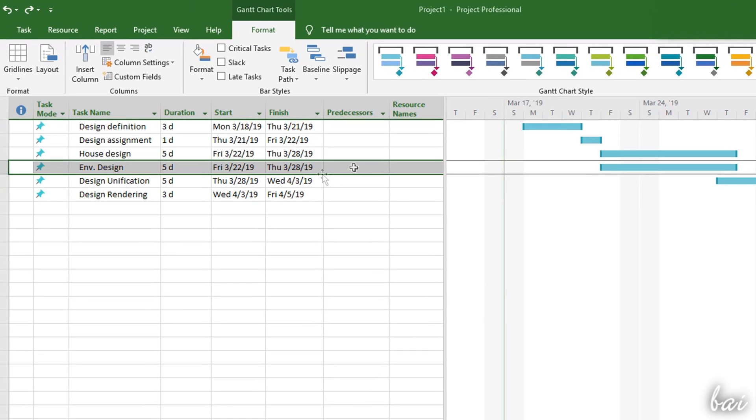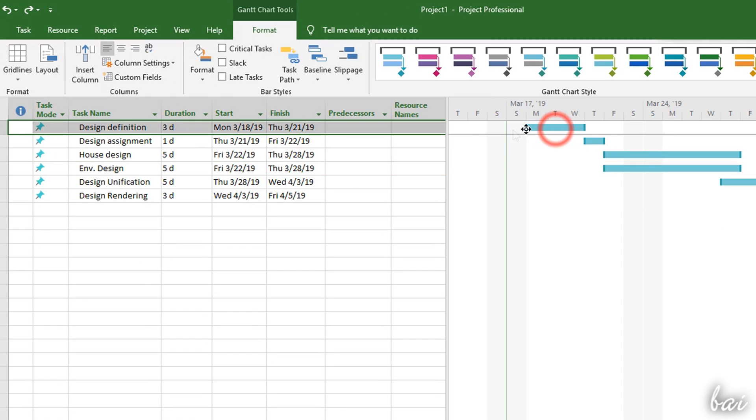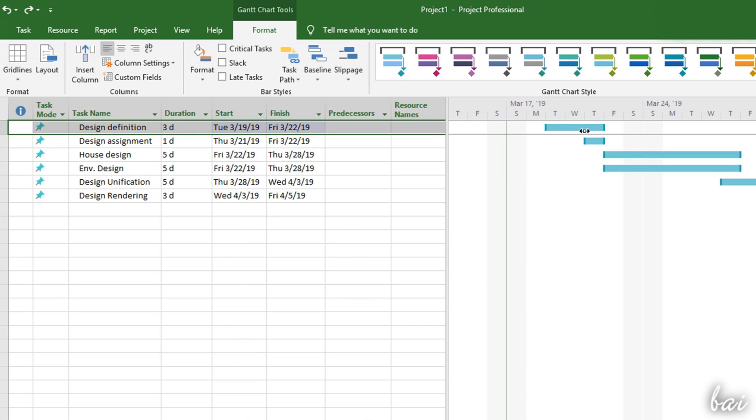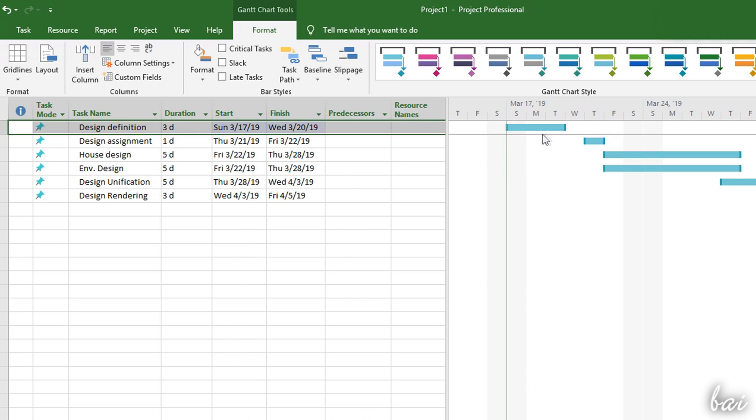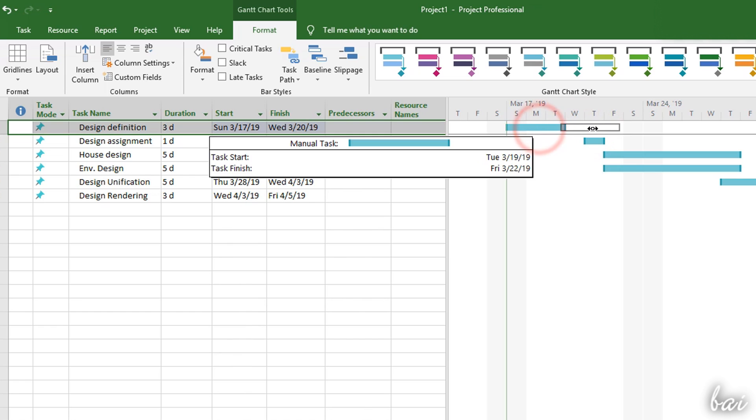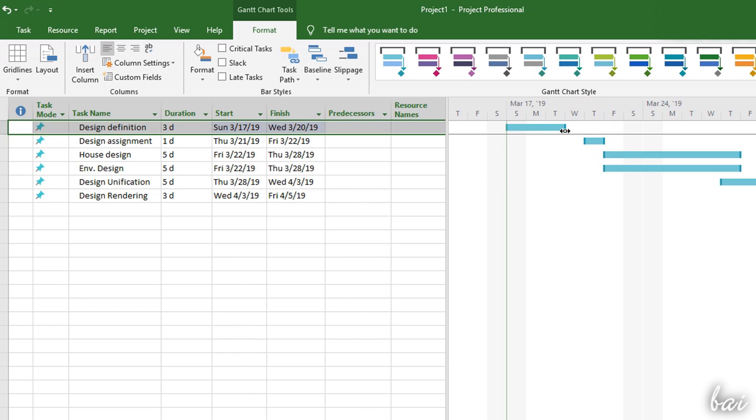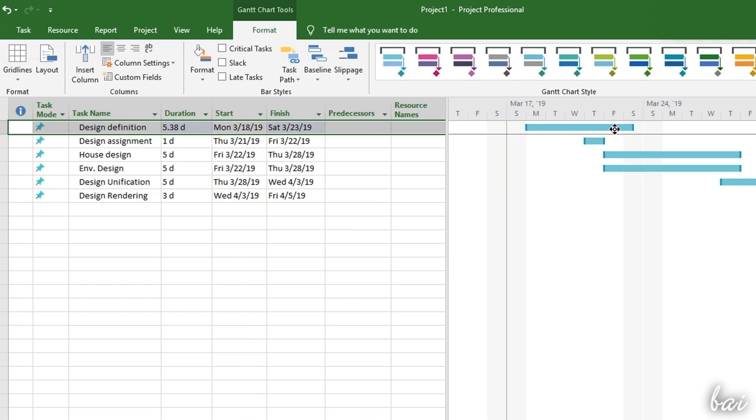You can also change the task start, finish dates and duration directly on its bar on the chart. Click and drag the bar to move it in time, and drag from its right edge to change its duration.